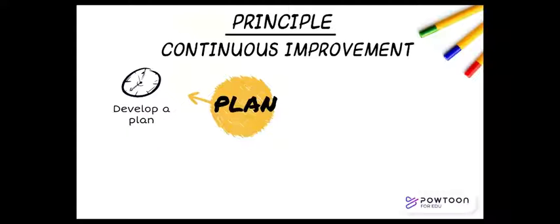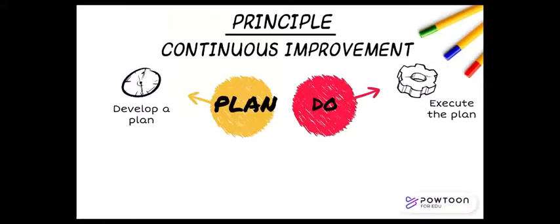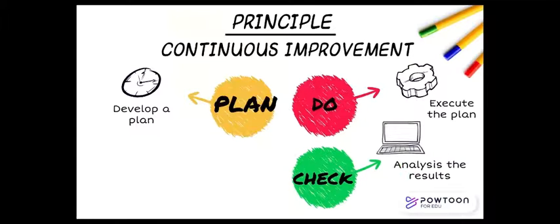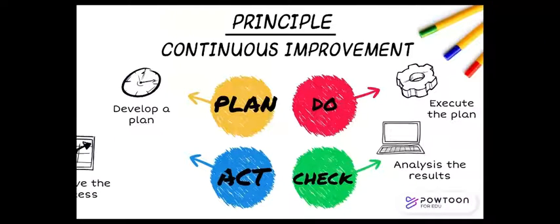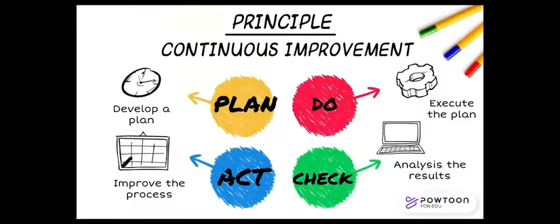There are some principles for quality management. First, continuous improvement. One formula is the PDCA cycle. The four-step model guides you first to develop a plan for improving a specific process, then to try out the idea, execute the plan. Next, analyze the results and implement any changes that give you improvement in the process. The last step is the longest. When it is done, another cycle begins.